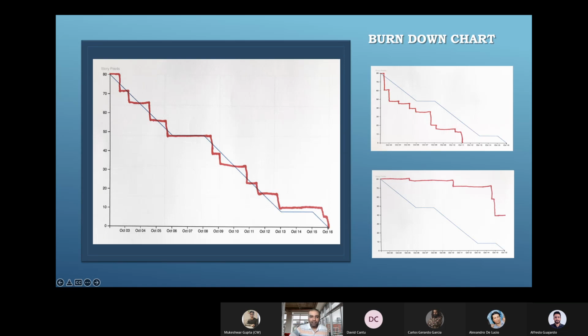So October 3, nothing happened. And October 4, you are seeing that there are a few stories which got completed, and the team members might have logged, they have updated the status over Jira or the tool which we are using. And once that story moved to ready for accept stage, or for acceptance by the product owner, it has been completed. That's why, at this particular point,